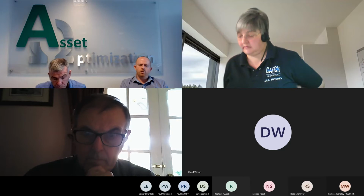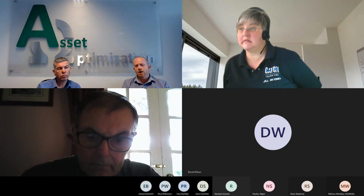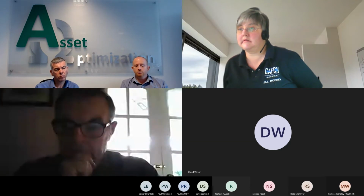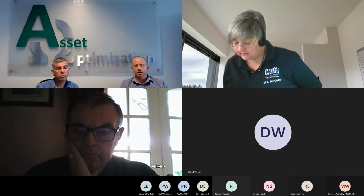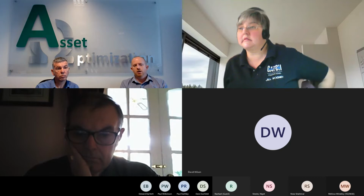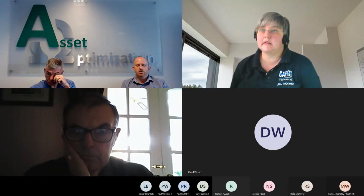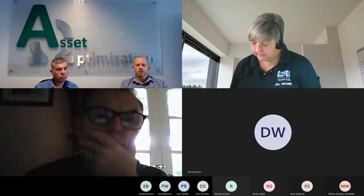Yeah, so it's quite often that we find the site won't have all the data required for a more advanced model. So at that point, what we can do is make some assumptions. We try to keep those conservative, and we always validate those assumptions with the technical experts on the plant to make sure that they're reasonable. Sometimes we do that for expediency to work through the project. If we've got to go out to, for example, OEMs, original equipment manufacturers, to get further data about certain parts of a compressor or a pump or something of that nature that's not well detailed, check for materials of construction or its design pressure capability or something of that nature. So yeah, sometimes we have to make assumptions.